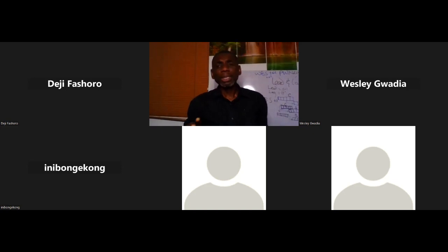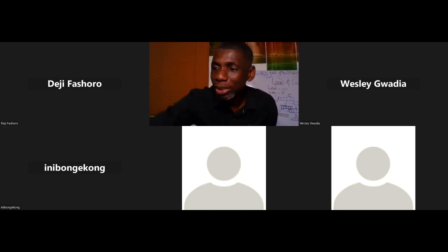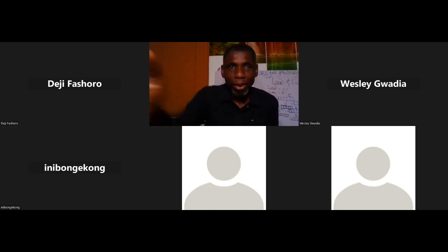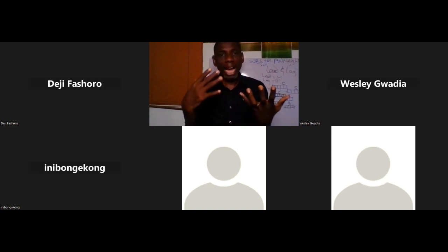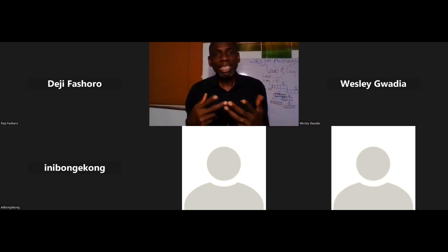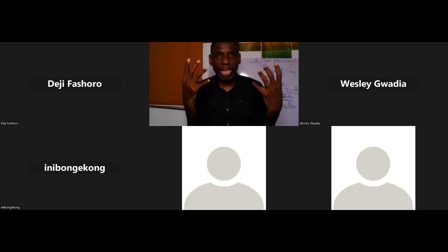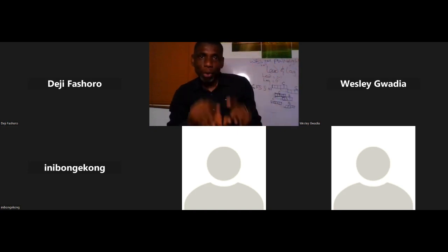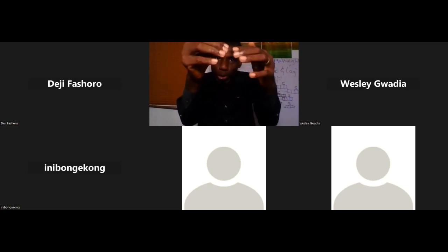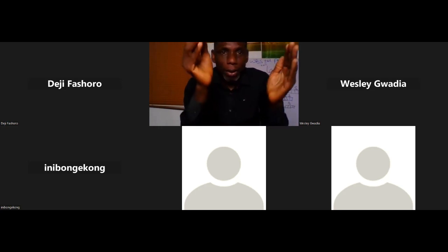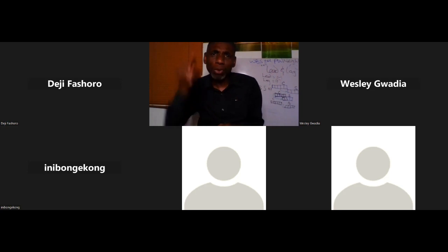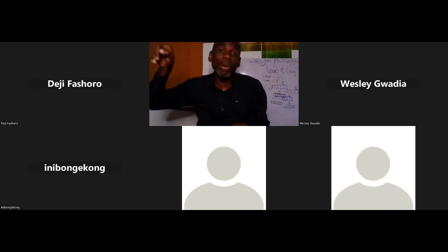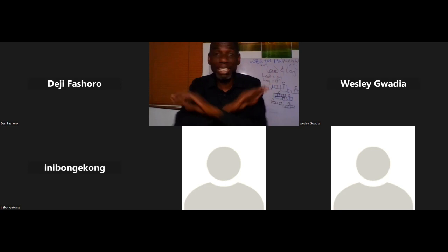Now, because the project was already scheduled, it's actually easier for the software to do your cash flow and put it into different weeks, because the software has a brain and it knows that in week 1 you are doing these activities. Those activities cost this for labor, this for material. It will separate it for you and say, week 1, project manager, prepare this with your client. Then it will go back to the schedule and look at your week 2 activity. It will do it all the way to week 200 in case the project is lasting 4 years.